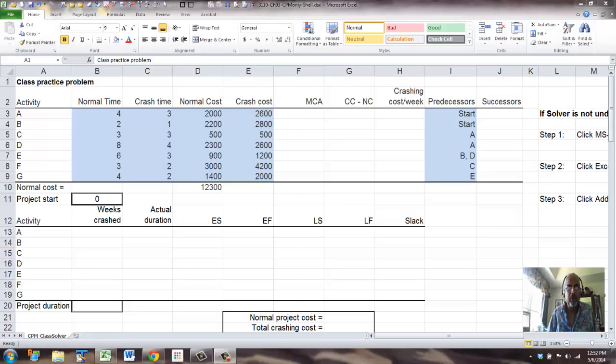In this video, we're going to look at the project crashing problem, but we're going to do this in Excel. The project crashing example that we worked out will work only when you have a very small problem, and even for small problems the computations can get quite complex when you have multiple critical paths. So instead, if we set this up in Excel, then we can run what is called Solver, and the combination, the model and Solver, can handle even very large size problems.